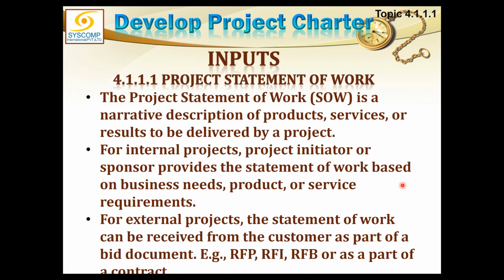For internal projects, the project initiator or sponsor provides the statement of work based on business case, business need, product or service requirement. This is only for the internal project. But if the project, we are doing it for some other organization, then they will create the statement of work. But if it is an internal project, one department to other, then probably the sponsor will create that. For external projects, the statement of work can be received from the customer as part of the bid document.